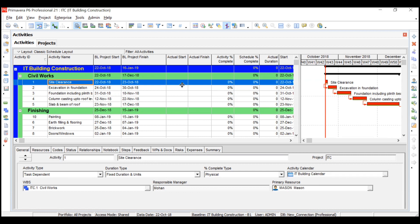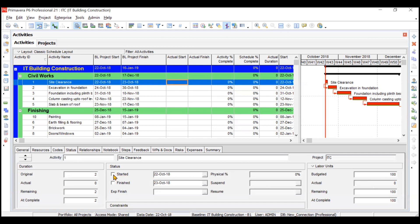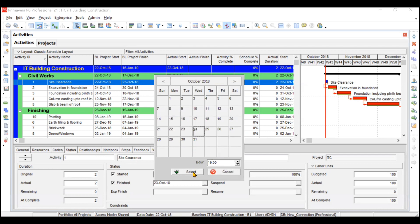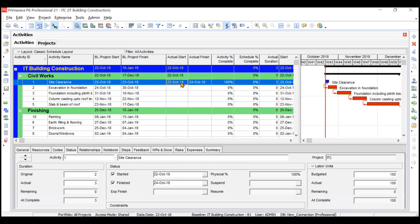For the first activity, Site Clearance, click on Started in the Status tab. It started on 22nd October as planned. We are assuming it got finished, but instead of finishing on 23rd October it got finished on 24th October — one day after the scheduled date. You can see Actual Start is 22nd October and Actual Finish is 24th, whereas the baseline is 22nd and 23rd. For completed activities you need not input the physical percentage — it will automatically be 100%, actual duration is three days, remaining is zero.